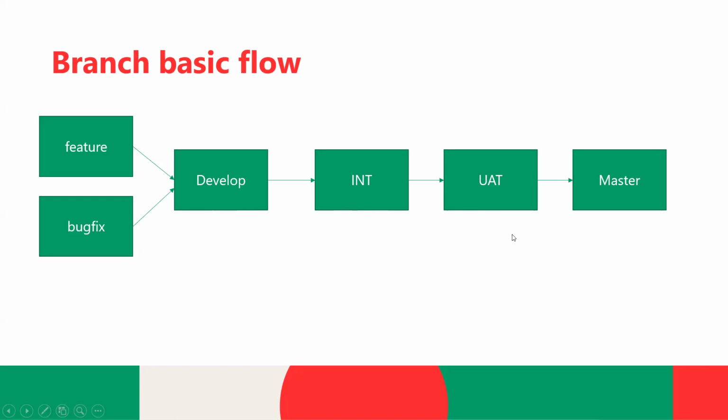Once we reach sprint 10, then what we will do again, we will create one release branch till sprint 10. Okay, we will not stop the current development process, the development process will go on, sprint 11 will go on, but that release branch contains till sprint 10 only, right? So that will be for our production deployment, release 2.